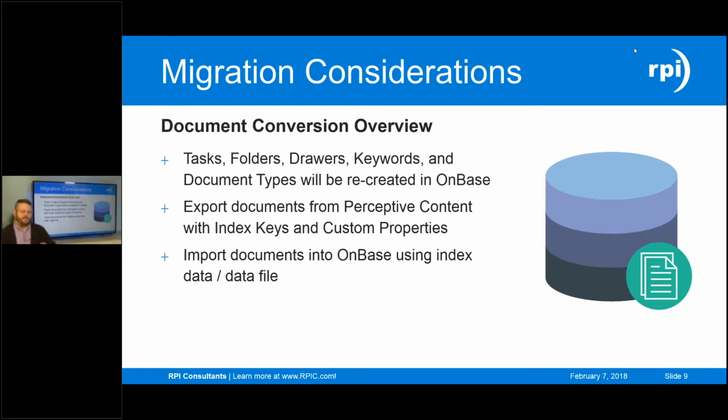So you can pull those documents into OnBase. You'll have to have your document types and keywords set up already, but once those are configured, we set up the import and it can just run. This is a lengthy process. Some organizations have tens of millions of documents in their system. So if you are in one of those organizations that's up in the millions, consider that this is more than likely a multi-day process.